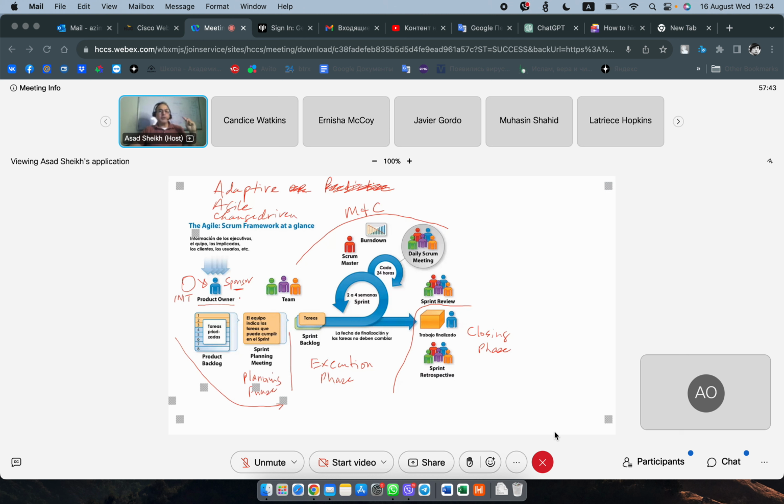Instead of going through change control like you would for a predictive method, if you have a change during your sprint, you can go to your product owner, and then the product owner will go to the customer and tell the customer, or he's going to add it to this bucket.